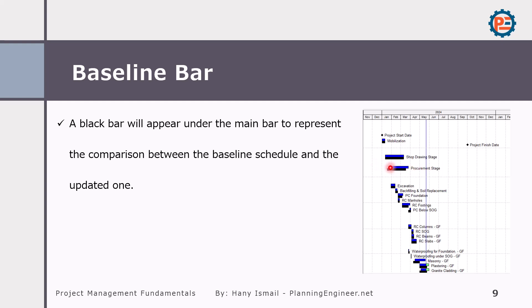The red means critical. Let me tell you the differences between the colors of the updated schedule. Blue means it is started and completed. As you can see here, this is our data date. Whatever is before the data date means it already happened.